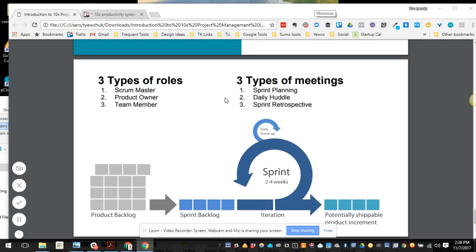We're always looking for, if people are getting burnt out or we're taking on too much or we're working on the wrong kind of stuff, what is one thing, just one small improvement, could be really tiny, that if we implement it into the next sprint next week, it'll either improve our team morale or our team velocity or make things easier, faster, better for the team. So we just focus on one small thing every week, and over time you get better. So that's the retrospective, looking at what was done in the last sprint, and then we come up with a small Kaizen or an improvement for the next week.